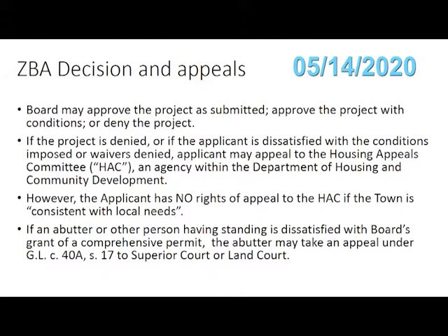At the same time, if the board approves the project with conditions, an abutter, someone with standing to appeal the board's decision to court, Superior Court or Land Court, takes their appeal under an entirely different statutory scheme. Where both the developer and the abutter appeal, which happens a lot, the abutter's appeal is stayed, frozen, for the entire time the developer's appeal is litigated at the Housing Appeals Committee, and then if it happens in Superior Court, and then if it goes on to the Appeals Court or the Supreme Judicial Court, it's stayed through that process as well. The abutter's appeal does not get heard until after the ZBA's case is exhausted. And that, of course, can take years.